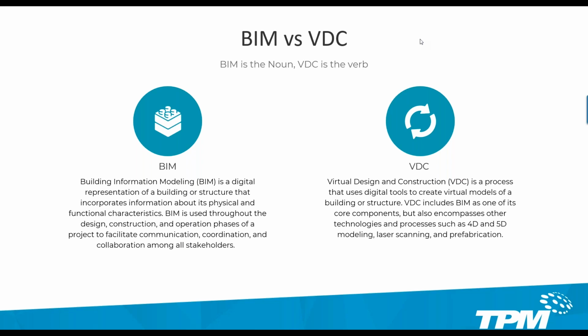When you're doing the VDC process, it's really important, on construction projects in particular, that your team is all under the same understanding. We don't want to have design teams that aren't comfortable sharing models. We don't want to have contractors leveraging models for things that they shouldn't be. So it really becomes quite an effort to make sure everyone's aligned and on the same page. There is a process called creating a BIM execution plan or a VDC execution plan, depending on who you talk to, and also making sure that you align with any contract requirements.